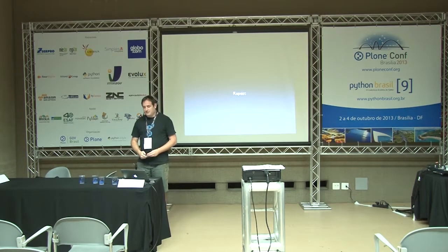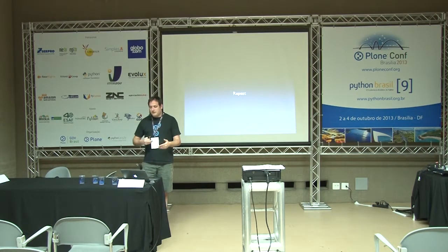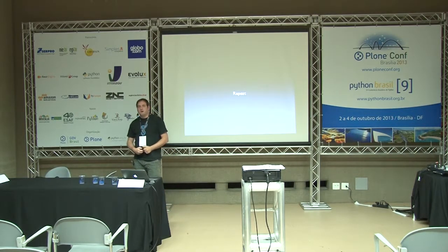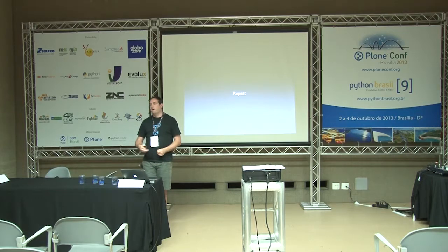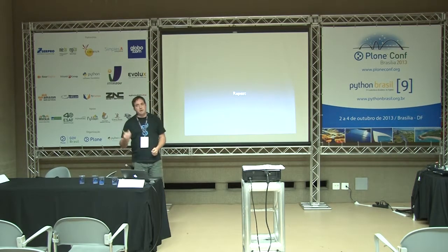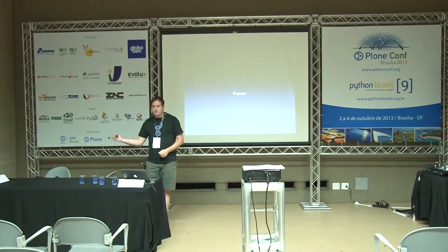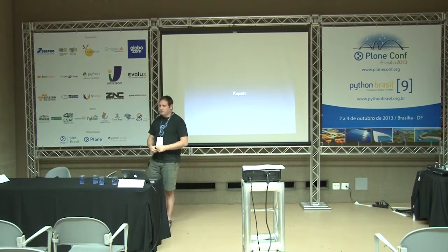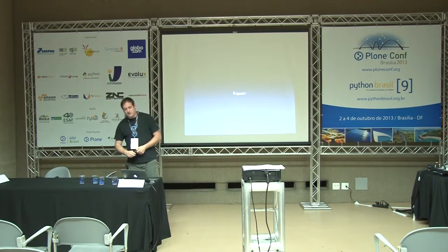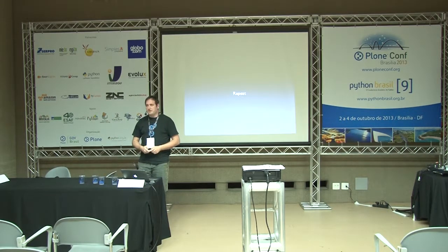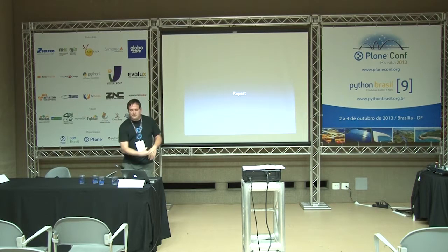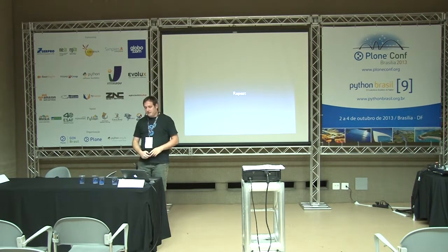So these things vary a lot, but what we usually do is, if there is no huge content restructuring, we tell the customer, okay, stop editing for one day, maybe two, maybe only half a day if it's a quick job, and we're going to get your site new again and just switch the web server, Nginx, turn it around, and the person visiting the page won't realize what changed.